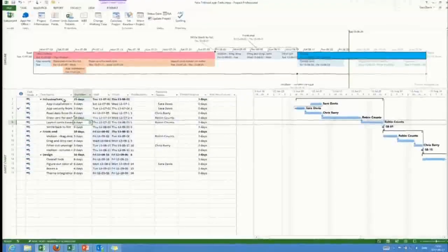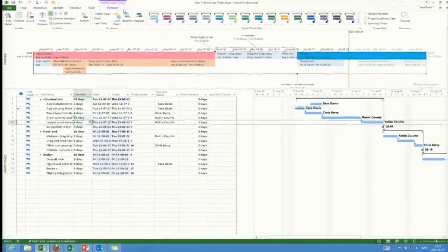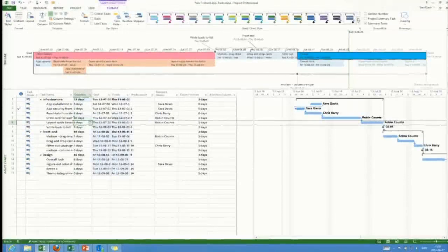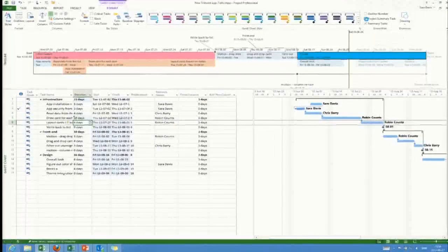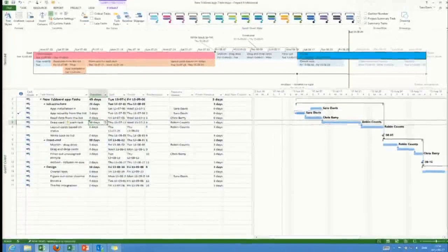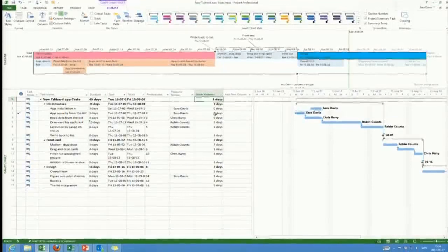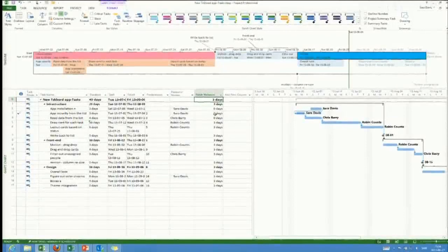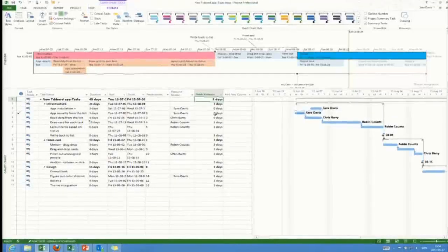For the second gold nugget, when it comes to project client knowledge, I will show you task 0. Up on the Format tab, we have Project Summary Task. Very important little button there. Clicking that will show you the entire project duration and finish date. We'll see that everything is now delayed 3 days. If you enter costs on your resources and do work with that as well, all that will be aggregated to the project level as well.